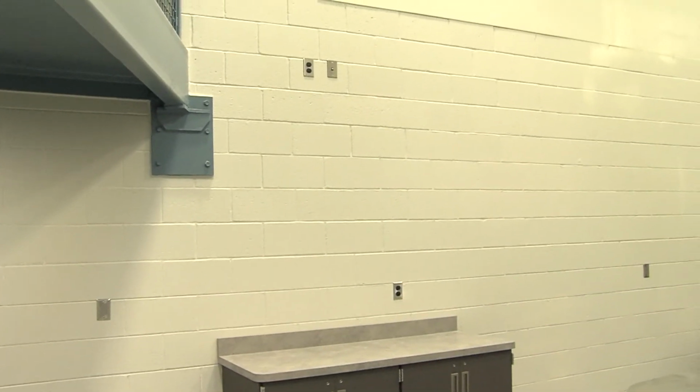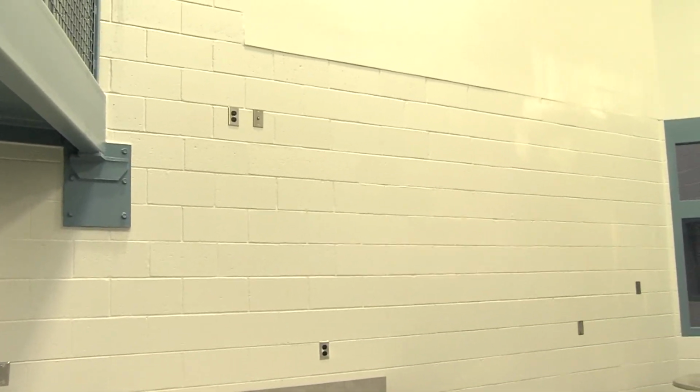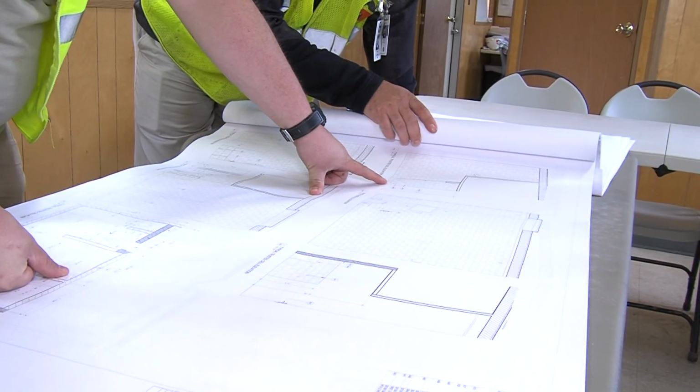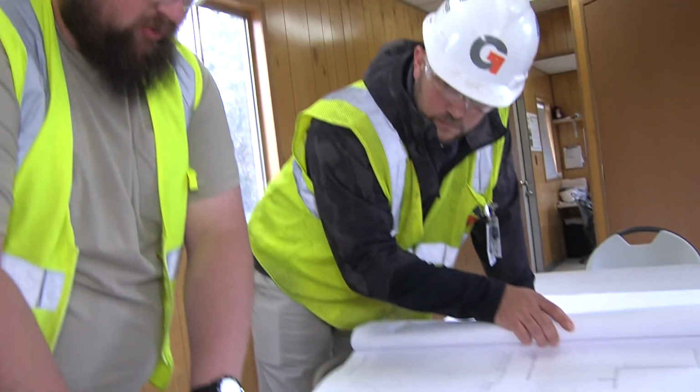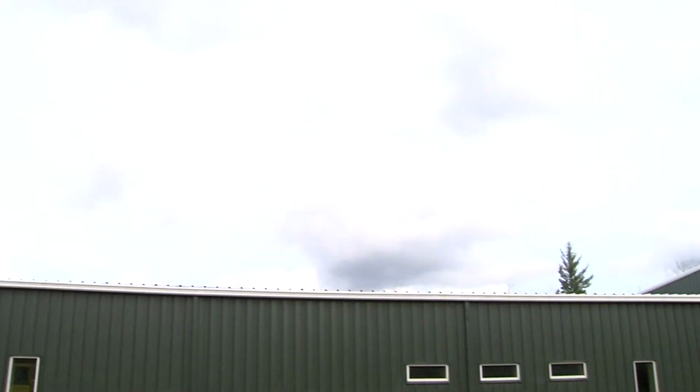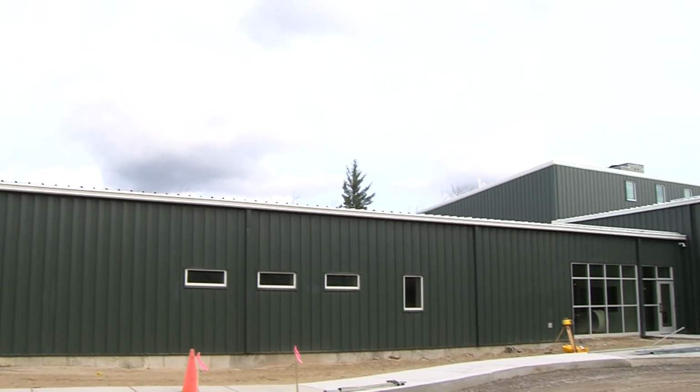Secondly, we knew we had to reduce masonry wall density. The original schematic floor plans that were developed prior to us being hired were congested and inefficient to build. The heights of masonry walls, the number of corners, short spans between intersecting walls, use of sub-day rooms, and the small room areas made this a difficult masonry job and thus drove up masonry costs. The alternate floor plan that was developed addressed these concerns and reduced the masonry wall costs. It is square.